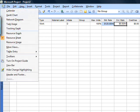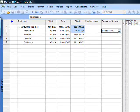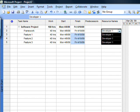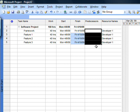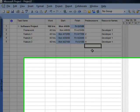Straight time. Now assign that resource to each of these items. Each item has 40 hours of work assigned to it. Let's create links — predecessors. I've conveniently ordered these visually in the order that they should be performed, so I'll just click there. It has generated this graphical Gantt chart for me automatically — I won't use that normally except for illustration.